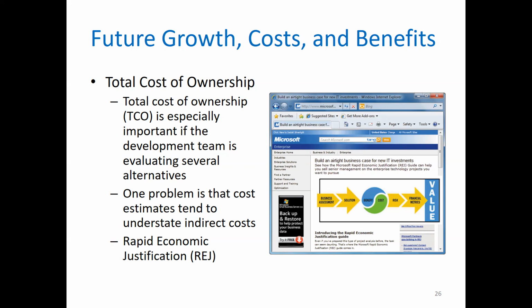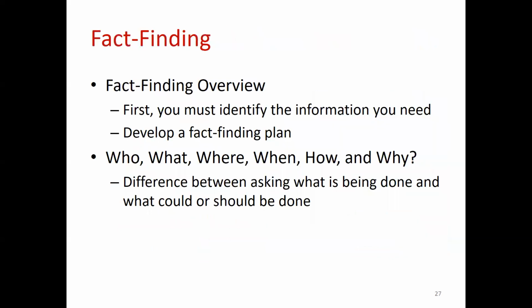Now, if I have to simplify that, overhead cost would be like your rent for the building, the utilities bill that you're paying, electricity, water bill. Generally, people tend to ignore these things, but they actually contribute to the cost of the system. How? You're using electricity to run your computers. You're paying rent to have a building. Even if you are using an existing building, you are using it for a different purpose. So your total cost of ownership needs to cater for all these indirect costs as well. All right, so this is what it's saying over there.